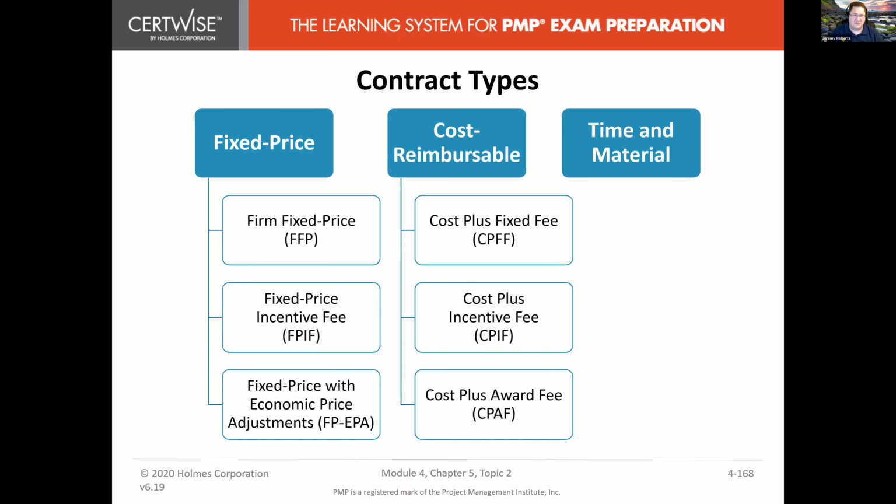They pay for the materials, but as long as a certain percentage of them meets the minimum quality standard, they could get an extra payment on top of it. So that encourages their manufacturers to produce to the specifications, make sure all the products are to the specifications so they can get that bonus or that award. Does that make sense? All right, cool.